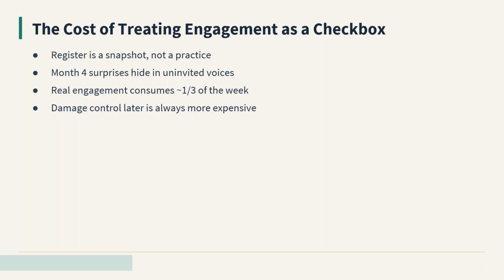The most common failure mode in stakeholder engagement is treating it as a one-time activity. You identify a list during planning, publish a stakeholder register, send monthly status reports, and assume you have done your duty. Then, in month 4, the project runs into a wall you did not see coming because a stakeholder you never actively engaged made a decision that cut your project off at the knees.